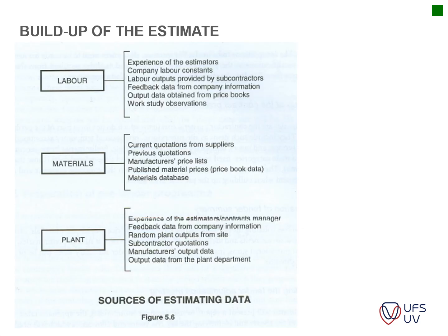So that is the building up of your estimate. Also a very important slide to know is your labor, the sources of estimating data. The accuracy of your rate build-ups is influenced by the experience of your estimator and labor constraints. How much labor do you have? Do you have to outsource other labor to assist you to actually get the numbers on site? Then there are labor outputs provided by the subcontractors: will they be able to actually do the work within the allotted time? And then feedback data from company information.